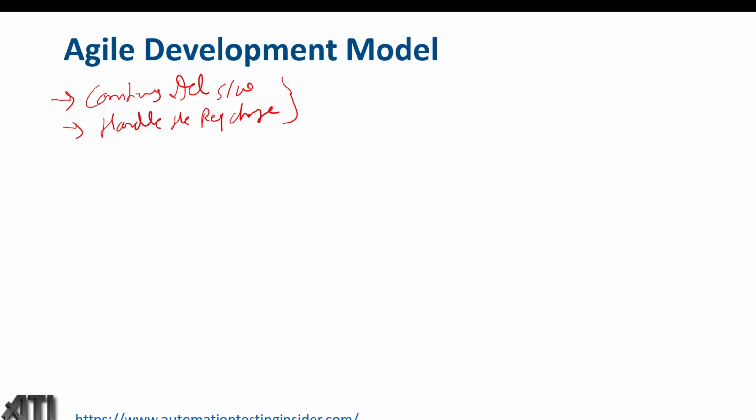Now there is a certain process to follow in the agile development model. There are certain stages. Take an example. We got a project from one customer, and the duration of that project is 1 year. The customer wants the software every 2 weeks. So we'll divide the complete requirements into different modules. Take an example, this is X, this is Y requirement, this is Z. So we have divided the different requirements into different modules. For each module, they want the software every 2 weeks.